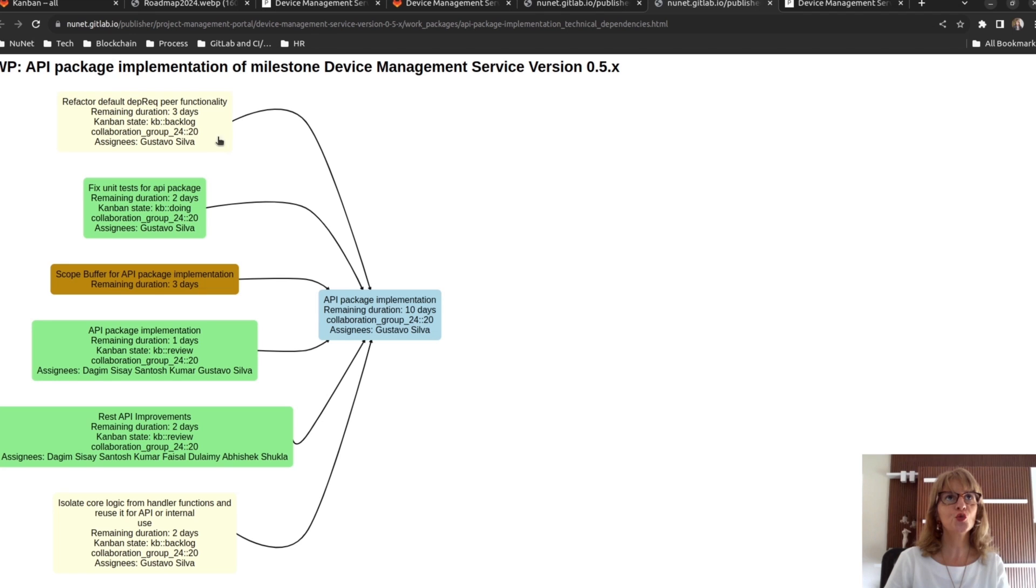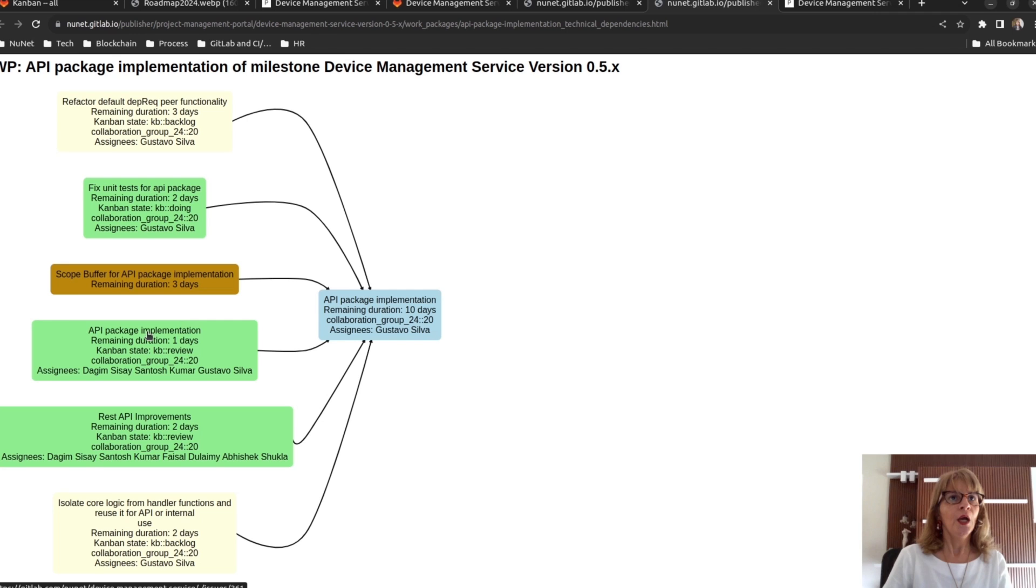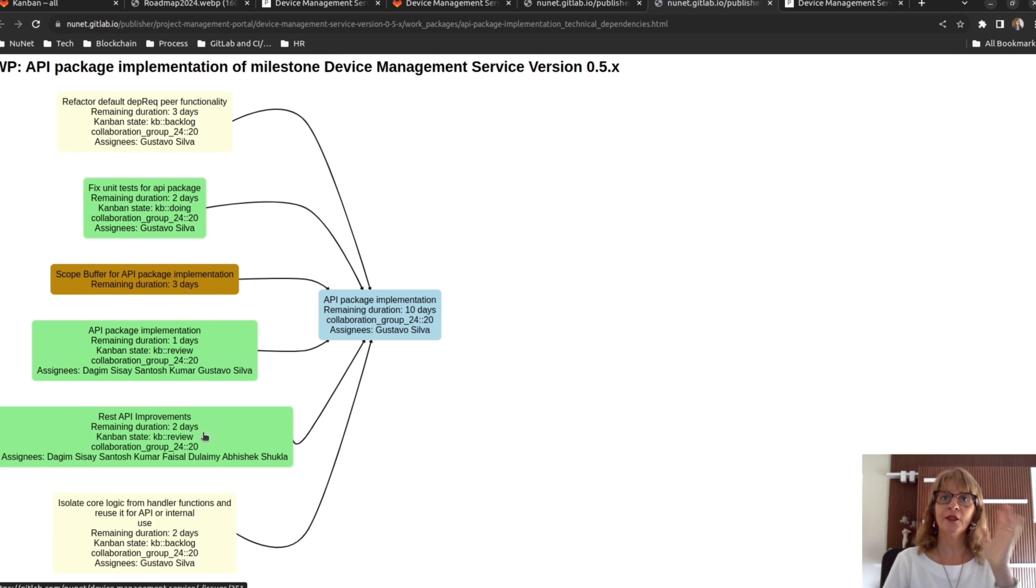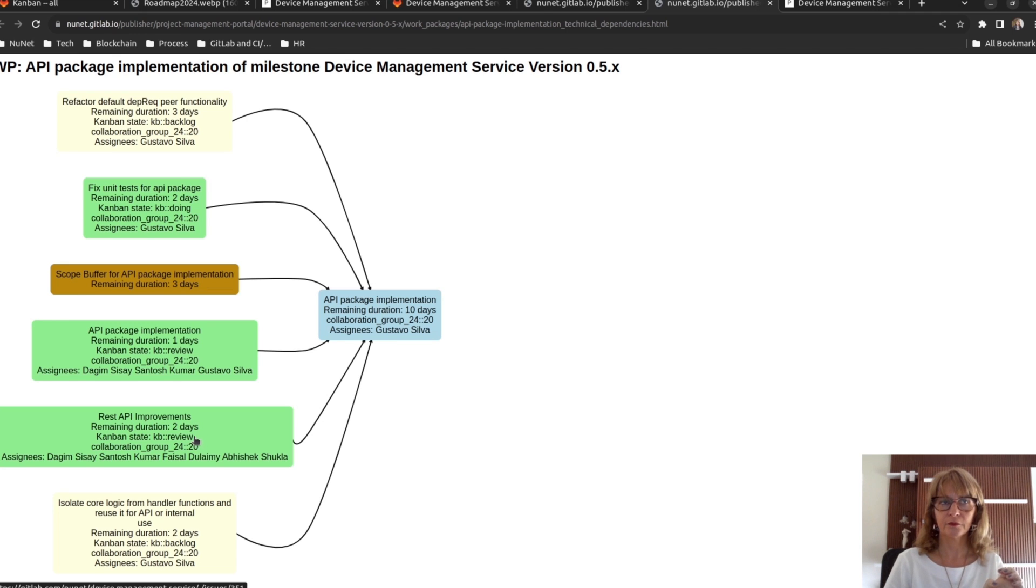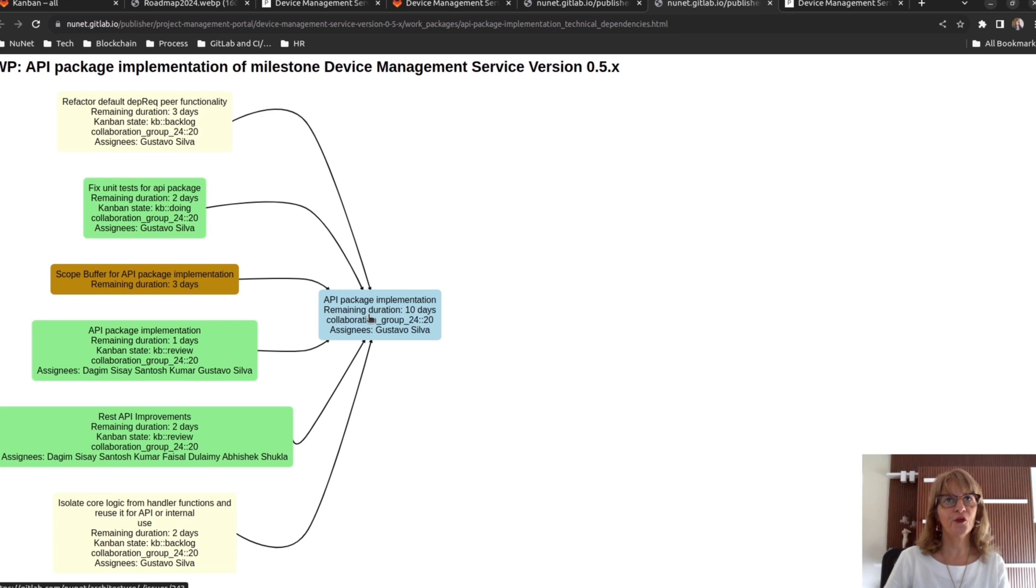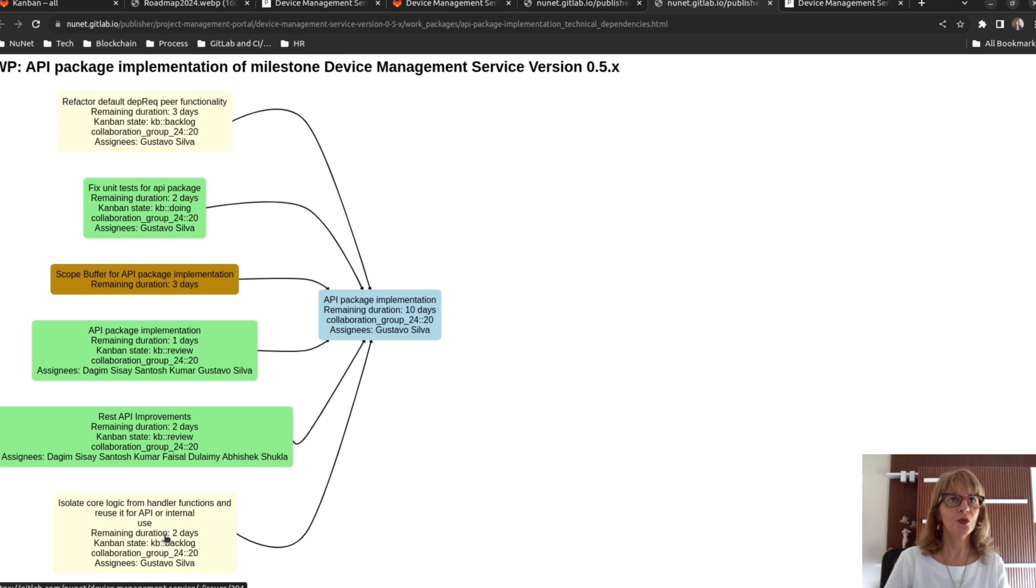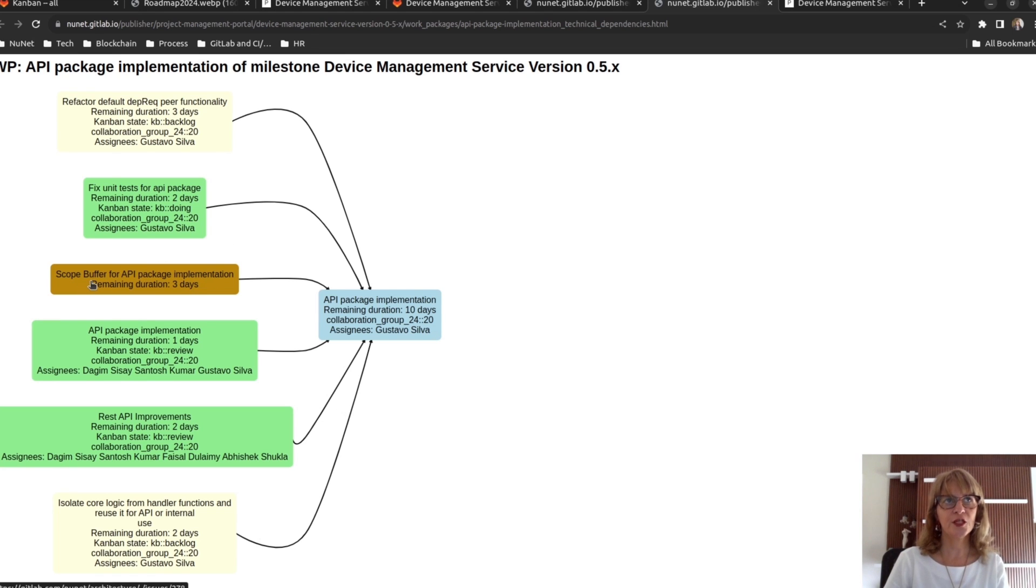We need to sum the remaining duration of each task. We didn't count review because the review will be done by another person, so it can be done in parallel. So, the remaining duration for the work package will be 3, plus 2, plus 2, and plus 3 days here in the scope buffer. So, 10 remaining days.